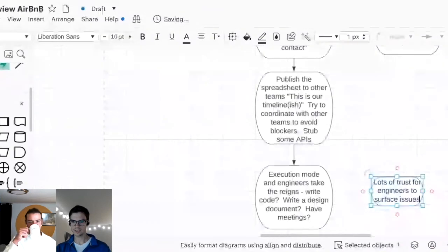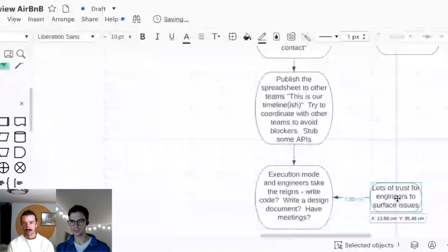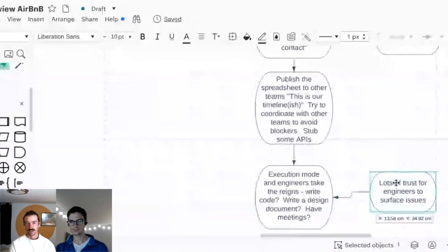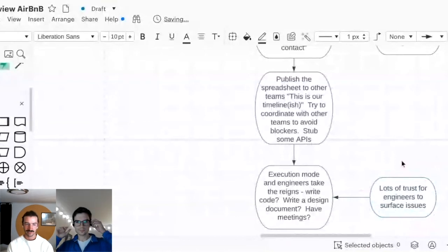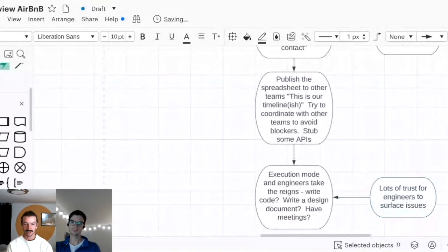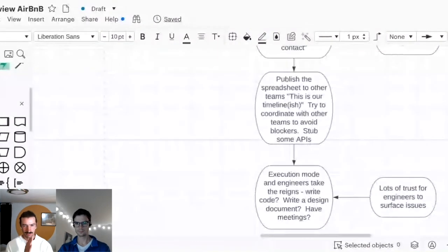And the second spreadsheet assumed an engineer would only work on one thing each week, or two things each week. Well, realistically, we know people are doing other stuff on the side, so I think we kind of treated each week as like half time on this project. But the idea was that you'd always have one main priority, big project.